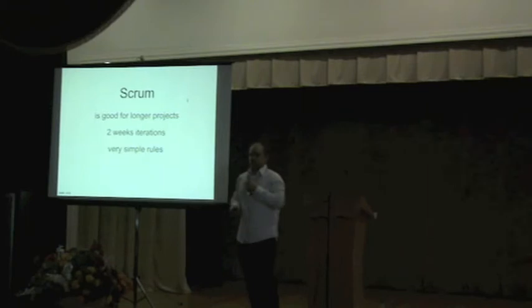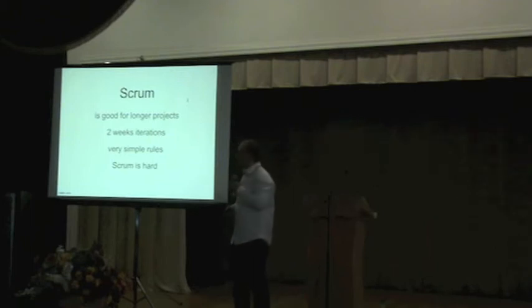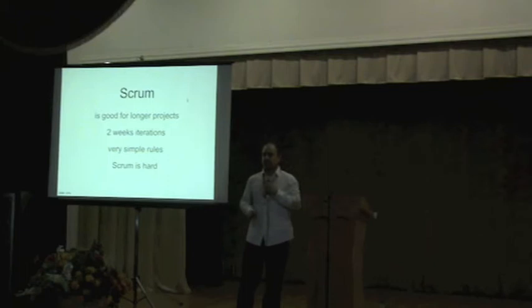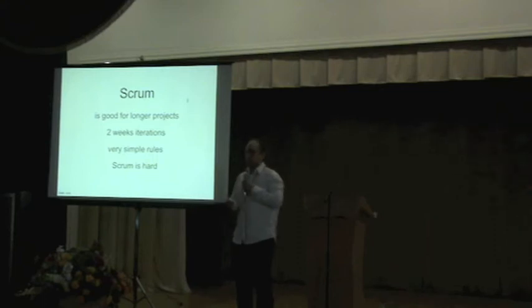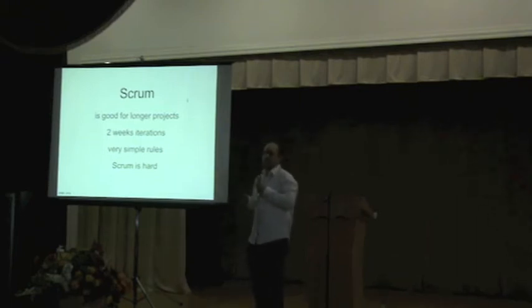And Scrum has got very simple rules, so it's easy to teach Scrum. But actually Scrum is hard. And I find Scrum to be the most hard for the clients, not actually for the team. Clients do not understand, for example, that you shouldn't interrupt the team with new features during development. If you have this problem with your clients and you cannot fix them, it's better for you to go with Kanban.